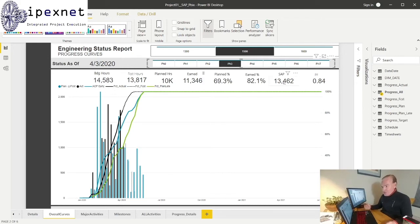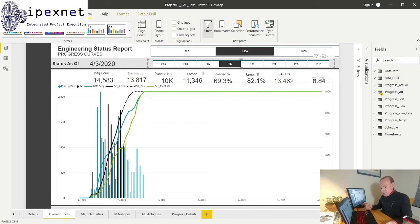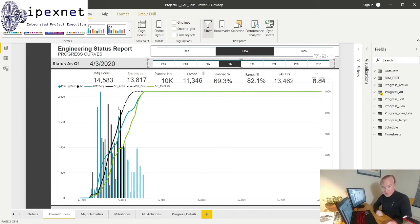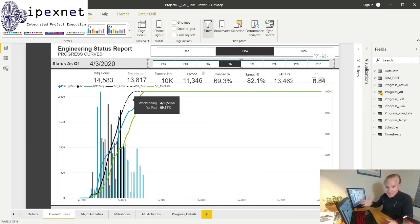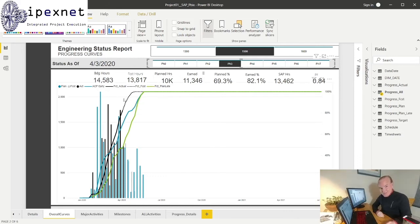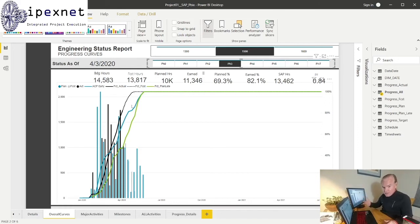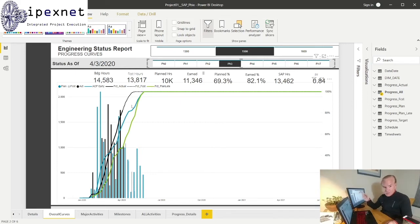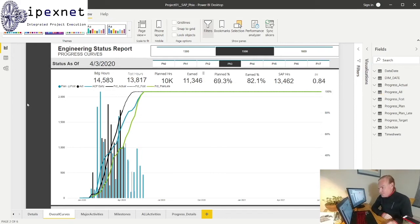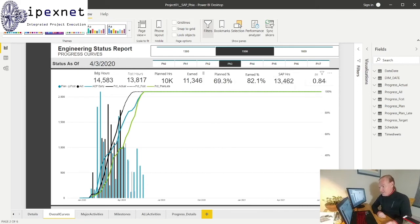What is actually going to be my forecast spend to get to 100? There might be - I might be doing great now, but you could actually foresee that I've got a problem where this remaining scope is going to cost me 30,000 man hours. You don't know, but maybe you build a staffing plan that showcases that, and you would be able to see that there'd be a big spike in forecast spend man hours. And then you could analyze your productivity factor to go and compare - well how many hours do I need to finish the rest of my scope? So anyway, those are just some quick ideas of, honestly, just how you put in spend hours into the dashboard, how you look at it, how you could calculate the productivity.